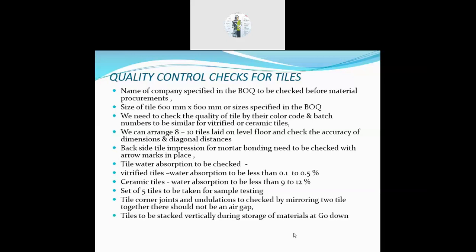Okay. They would have given tile laying procedure, mortar proportion. Some people will give 1:5, some people will give 1:4. So all those proportions you have to check and put the cost. As you have seen, 1:4 cement mortar itself will cost around 7,000 to 8,000 rupees. In case of 1:6, it is 6,000 plus. In case of 1:4, it will be around 8,000 because 9 bags of cement is going. So hardly 3 bags of cement itself will cost you around 1,200 to 1,600 rupees extra. Similarly, you have to take care of all the cost factors before you quote for a project.